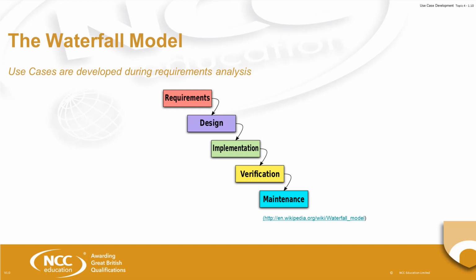The aim being that you will actually implement those, and then if you've got time you can go and have a look at priority 2 and then maybe priority 3. The other thing I'll say at this stage is that you would go through the whole waterfall model using your priority 1 use cases. So you'll create a full set of use cases, prioritize them, and then you'll go through the design, implementation, testing and maintenance phases for the priority 1 use cases and create a completed system.